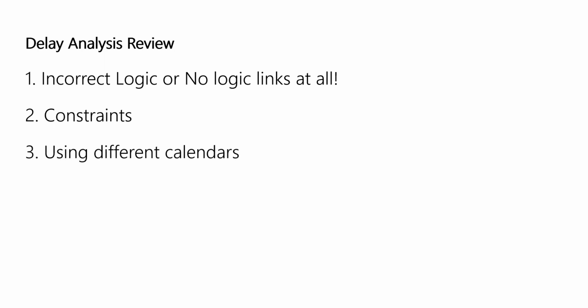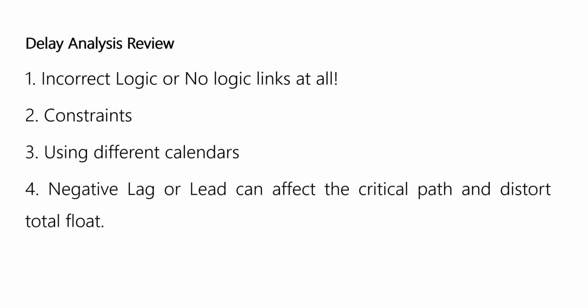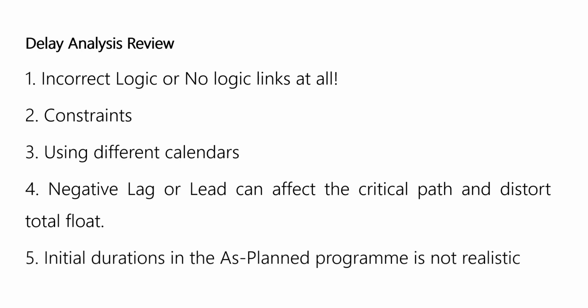Fourth, check for negative lags, as this can affect the critical path and distort total float. And finally, review the durations included in the as-planned program. If they are not realistic or achievable, the program loses credibility.